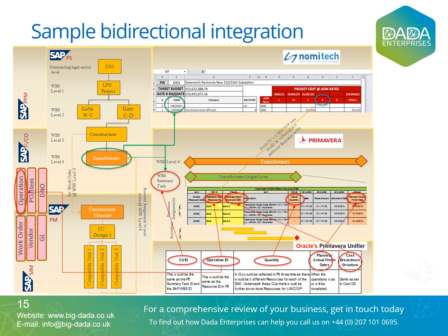A company may book their time, manage their assets, revenue, accounts payable, receivables, etc. in their Enterprise Resource Planning (ERP) and Enterprise Asset Management (EAM) system, like BAN or SAP. However, they may schedule their projects in another application like Primavera or MS Project, and use another system like Deltek Cobra to produce earned value performance metrics. Other systems may separately be involved to manage change requests, for example CRM or Primavera Unifier, develop their cost estimates, for example Nomitech CostOS, or manage their risks, for example Active Risk Manager.